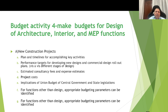Activity number four is making the budget for the design of architecture, interior, and MVP functions. This will be different for each function and each industry. In the context of the construction industry and design function, the budgeting parameters for new construction projects include: plan and timelines for accomplishing key activities; performance targets for developing new designs and commercial design rollout plans vis-à-vis different stages of design; estimated consultancy fees and expense estimates; and project cost implications of the union budget, central government, and state legislation.